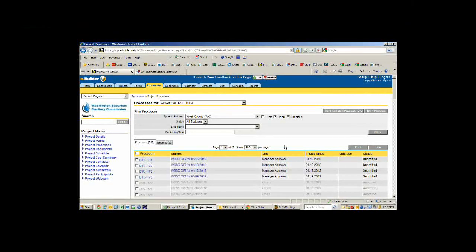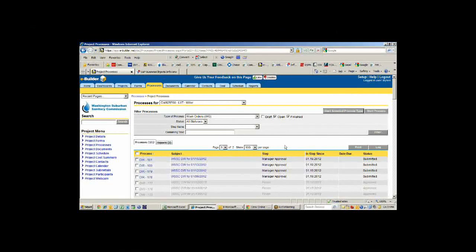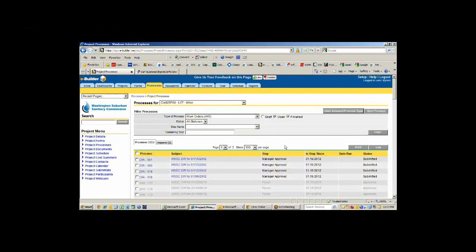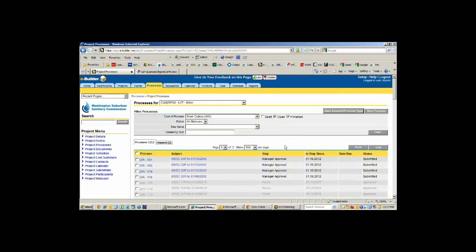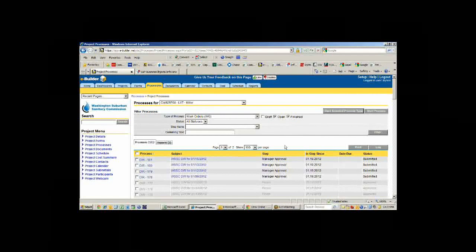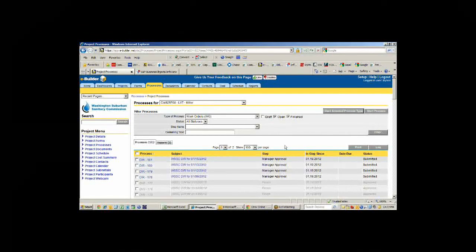It eliminates a lot of work. We used to have to do that work by hand. At the end of the job, they would collect all the work orders and give them to the secretary and she would have to manually go through and update the quantities. Now by using eBuilder, we do all that automatically.